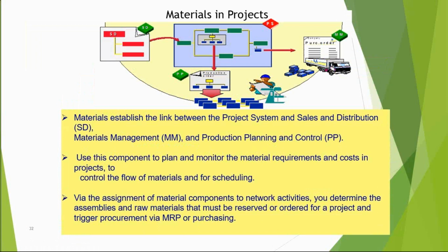Once we have the finished goods, those goods will be assigned to my WBS, and my WBS will be the account assignment in my sales order. In the same sales order, the same material will be assigned to my sales order. And once the finished goods are issued to the sales order, from the sales order it goes as delivery to the customer. Okay. Here the sales order is there to deliver the project stock to the customer, but the sales order would not act as a requirement generation element. So all the requirements to the production planning team are generated through the internal order assignment to the project activity. Is it?